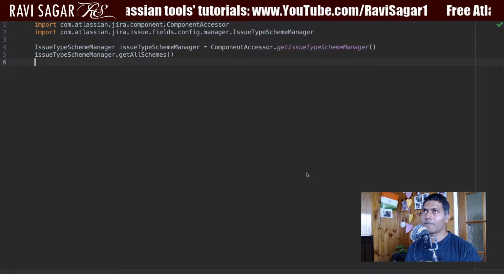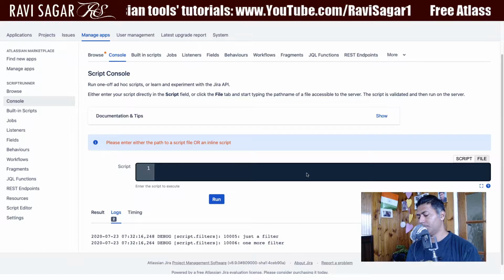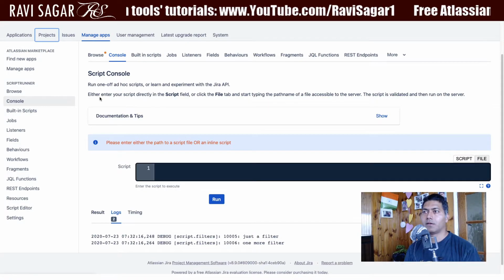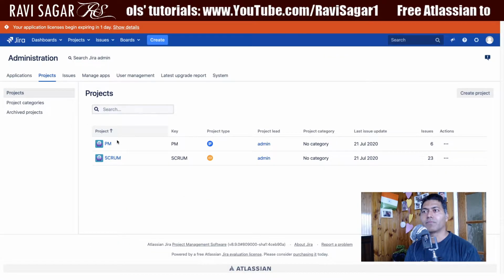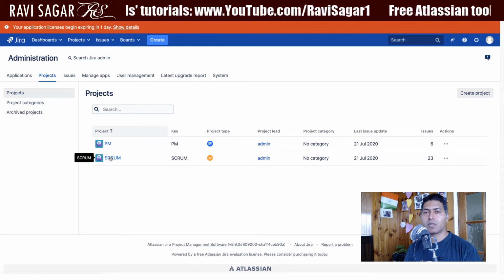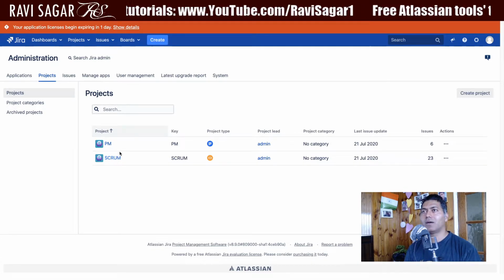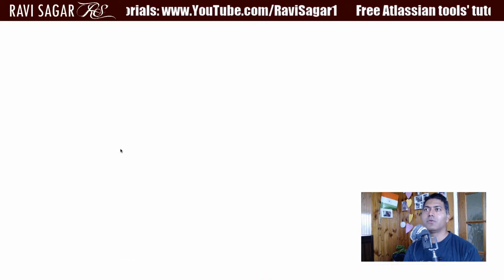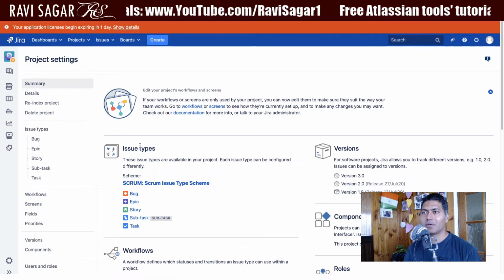Now, when you talk about a project in Jira, if you go to one of the projects and take a look at the schemes, the very first scheme is the issue type scheme, and these issue type schemes are basically used to define what issue types you want in your project.